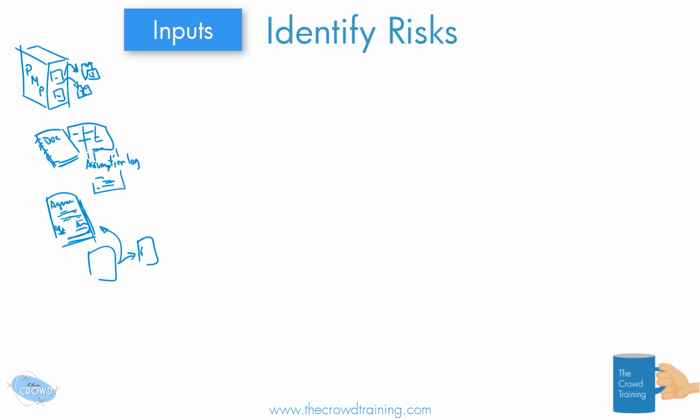There could be even documentation that goes out before this agreement, or maybe we send out to other clients and customers, like requests for quotes, requests for proposals, any of those, but altogether we just kind of refer to those as the procurement documentation. Even as we're developing that procurement documentation, we might say, this could be a risk that we didn't think about until we started working with the other vendors or suppliers or even other departments within our organization.